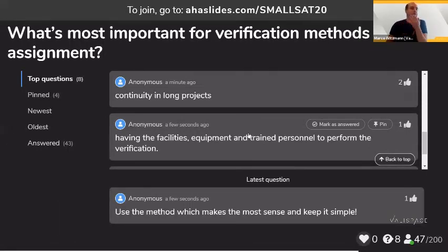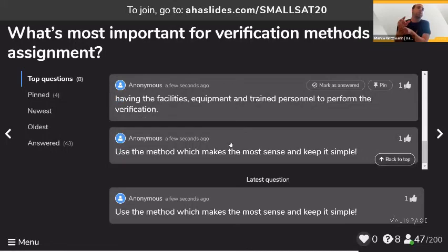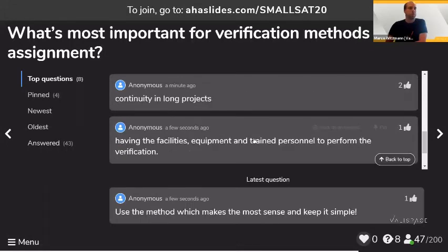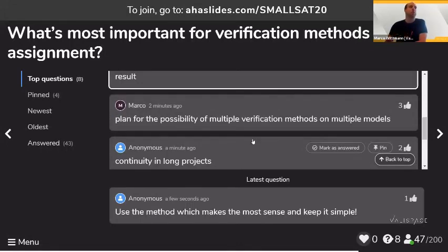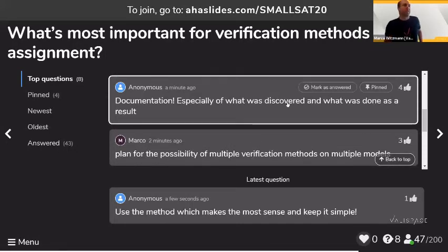Also think about the question, when you break down requirements: if I have verified each of the children, does that verify my parent automatically? Do I need a dedicated test for this? That's something that oftentimes gets overlooked. So at least think about this beforehand, so that once you come to the closeout you don't find, oh shit, we should have actually put more system tests in place that we didn't think of before.